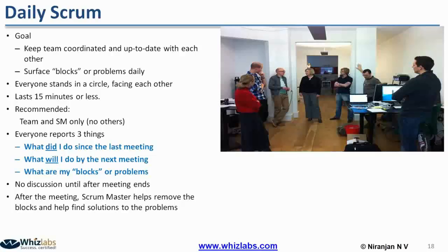Okay, when you want to have a daily stand-up meeting is also a question. For the daily stand-up meeting, there are certain guidelines. It can be held before the work gets started, on the first activity in the morning, or it can be done at the end of the day. Normally this is not scheduled in between, in the middle of the day.